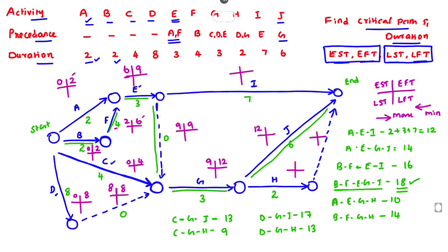Continuing forward: activity H has EST = 12, EFT = 14. Activity J has EST = 12, EFT = 18. Activity I has EST = 9, EFT = 16. The EST and EFT forward pass is complete. For LST and LFT, the last node value is 18. Working backward: LFT of J = 18, LST of J = 18 − 6 = 12. LFT of I = 18, LST of I = 18 − 7 = 11. LFT of H = 18, LST of H = 18 − 2 = 16.